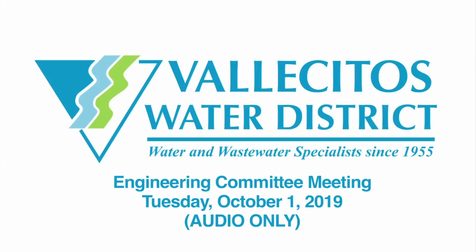REC Solar had a higher cost, but they had some assumptions. So we asked them for the best and final offer. Can you lock down your assumptions, and can you lower the cost? Are you willing to do that? They said, we may lower the cost, but we're not going to lock down our assumptions. We're not going to take the risk. It's all about the racking system and how they mount it. They want a process where they could go out and get a racking system, and we'll blindly approve it, and they said they may pass along the savings to us. May. So we didn't like that answer.